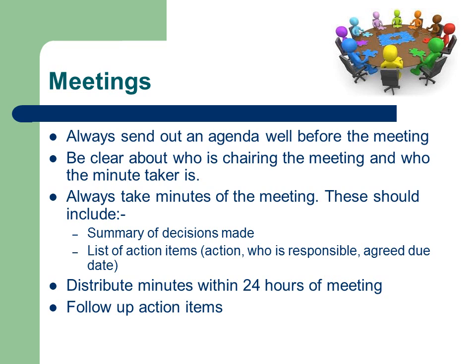It's pointless to expect a person to have done their action item if they received the minutes 2 hours before the next meeting. People are often very busy and need to be reminded by receiving the minutes. Action items should be followed up at the next meeting, or if they are due before the next meeting, they should be followed up at the due date.